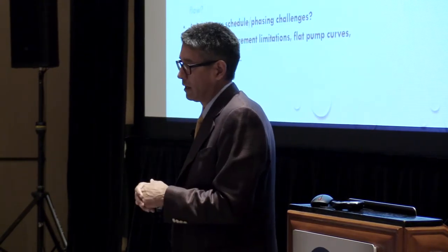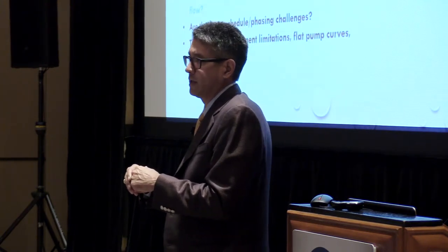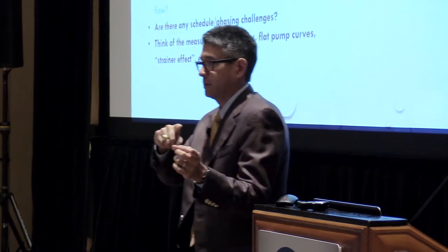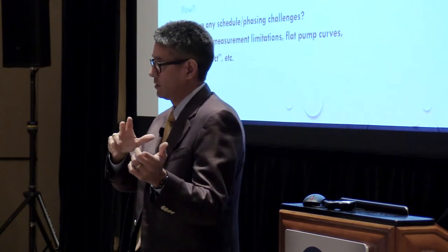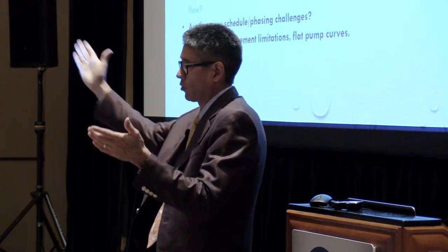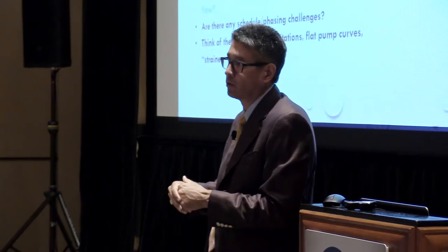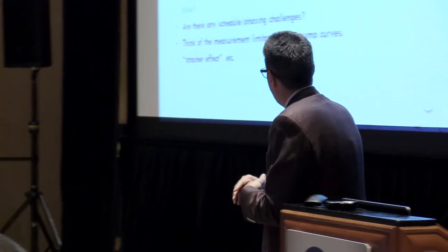I would say probably one of the best things about the commissioning process that's come about in our industry, it's forcing the owners now to think of a schedule beforehand, and now they're doing their pull schedules, working from move-in date, how much commissioning time, balance time, working back, and now we're starting to see some time to get the work done and be able to do it correctly. So that's been one great benefit that we've seen in that side.